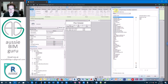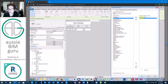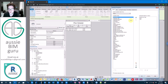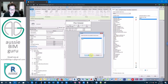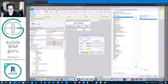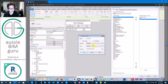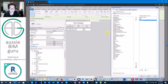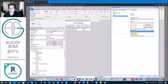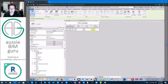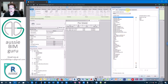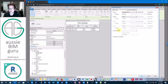Add a calculated field for total cost — area times cost. Again there'll be unit challenges, so divide by one meter and one meter to manage the units out. That lets it through. Then calculate totals, apply field format with two decimal places, dollars, and digit grouping. You can see the total cost — the 300mm floor has half as much area but is twice as expensive, so the cost ends up the same. Turn on grand totals for an overall combined total.